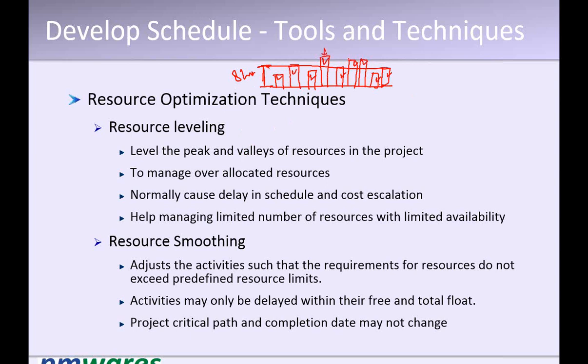So when you press it down, the project goes in that direction and gets expanded. It is a kind of bulge which has come into the project. When you push this bulge down, the project extends. So what you do is this comes to the next day, or gets added to this. These two things will come on the next day. So this will become 8 hours, this will become this, and this will become next. So one more day gets added. Okay, if there is a space, it will get adjusted. If there is no space, then the project gets extended.